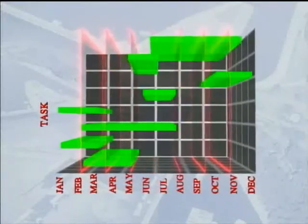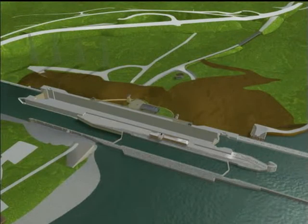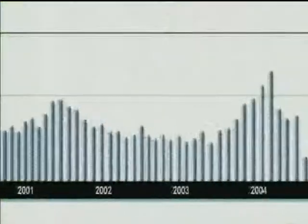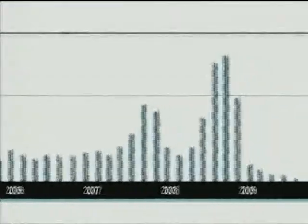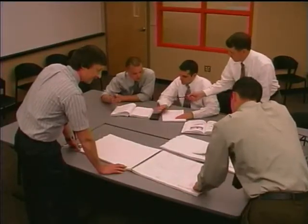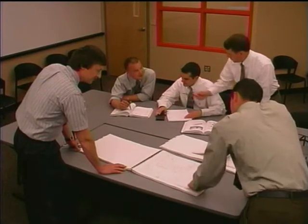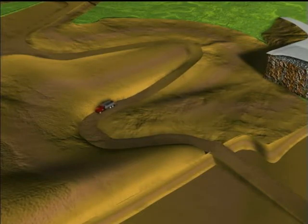The comprehensive but flexible schedule was configured to permit optimization of design and construction based on both the logistical progression of work and available funding. In addition, spending spread relationships were developed, along with peak employment estimates for each year of construction. The schedule created for this project will serve as both a planning tool and a monitoring tool throughout the course of design and construction. The schedule, coupled with the construction-based techniques developed to mitigate conflicts, permits optimal use of available resources and ensures timely and efficient completion of this important project.